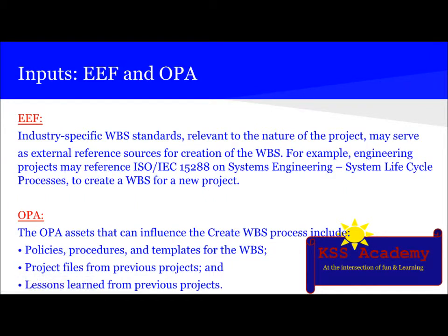The EEF and OPA, as we have learned in the past, so let's see specific to this particular process, which is create WBS. For create WBS, the industry-specific WBS standard relevant to the nature of the project may serve as an external reference source for creation of the WBS. For example, an engineering project may reference ISO IEC 15288 on system engineering, system lifecycle processes to create WBS for a